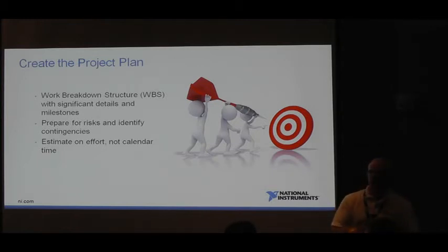Also, as you're setting up the work breakdown structure, focus on estimates based not on the calendar, a 1-day or 1-week effort, but really try to analyze, okay, this task is going to take 12 hours, or I estimate it'll take 20 or 32 hours, something like that.